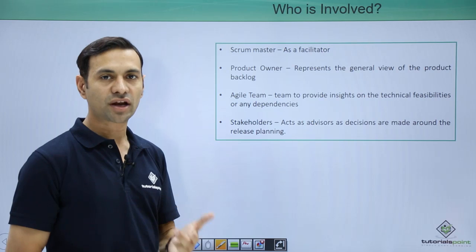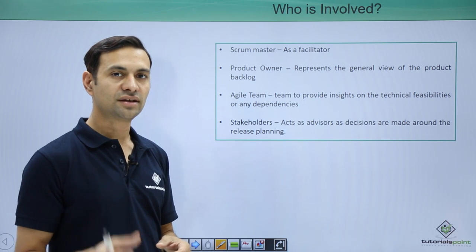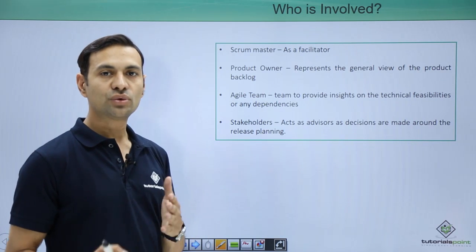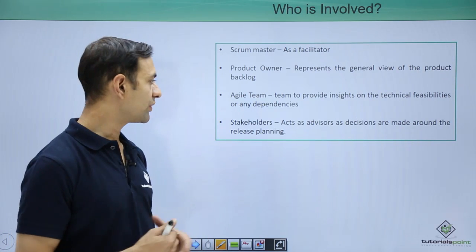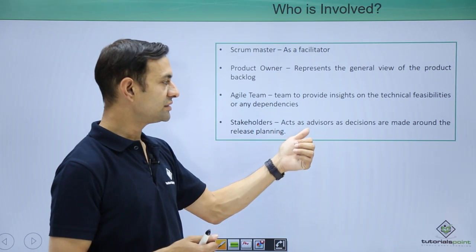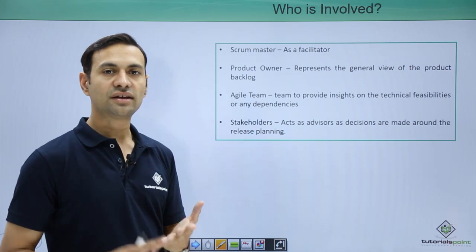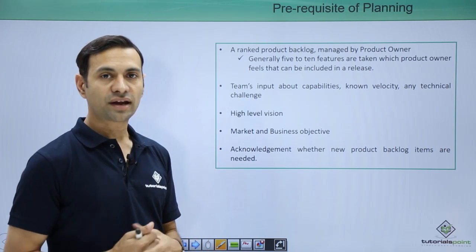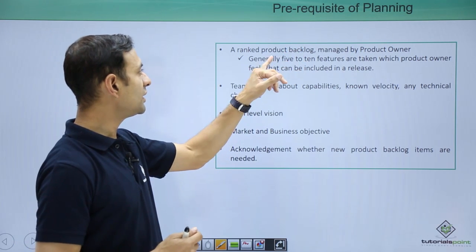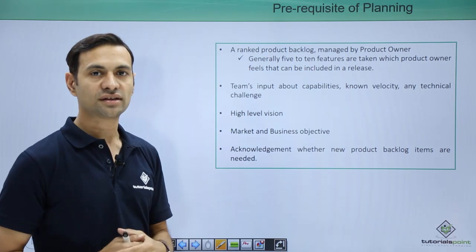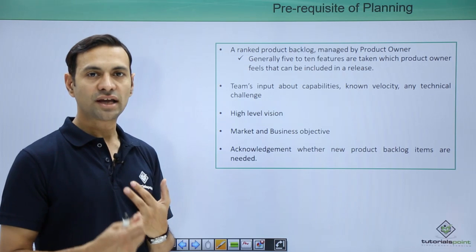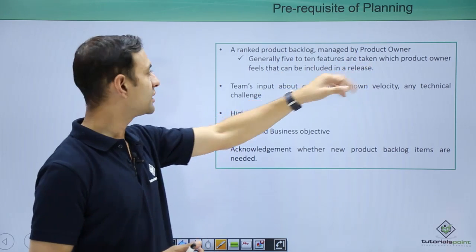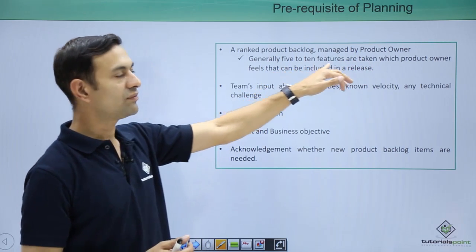Dependencies are features that cannot be developed without a particular dependency being completed first. Stakeholders are advisors whose decisions can influence a particular functionality to be developed, so stakeholders act as advisors so that decisions are made around the release planning. Now let us see the prerequisites of planning. The product backlog should be ranked properly — ranking means identifying which is a high priority feature and which is a low priority feature. Once this ranking is done, which is managed by the product owner, you normally have 5 to 10 features which can be included in a release.